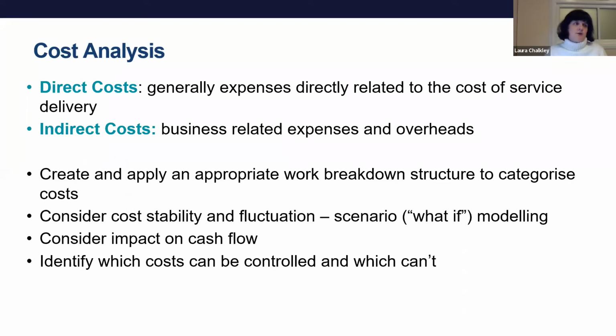When you're analysing your costs, the first thing I would recommend is to make sure you create and apply an appropriate work breakdown structure, so you've got a consistent means of identifying costs and categorising them. Not only will that make sure that they're consistent, but it'll also help you to ensure that you don't miss anything.